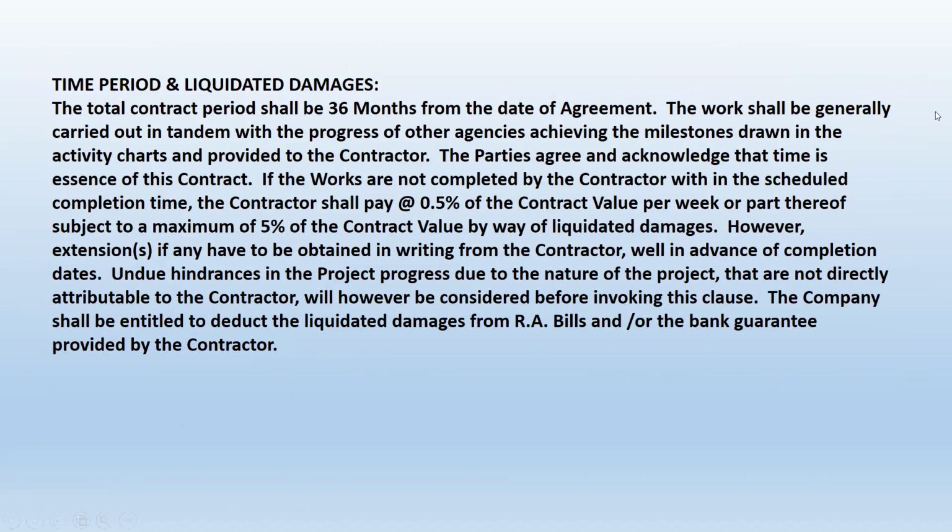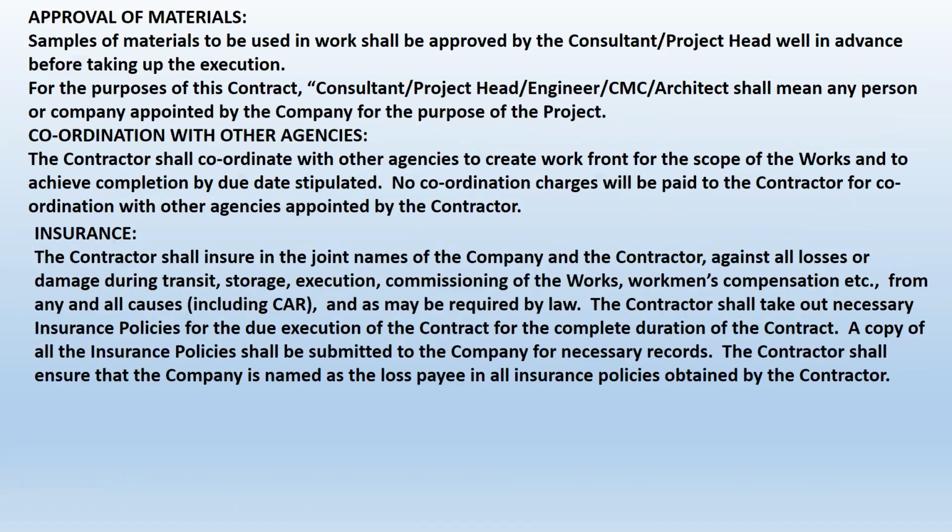Time period. Let us say your project is supposed to be done in 36 months, you have to mention the 36 months. Then you can give a plus or minus certain period as a grace period. If the work is not completed in the agreed period, what will be the penalty you will be charging? And the penalty should not exceed what percentage? All these things have to be incorporated in the work order.